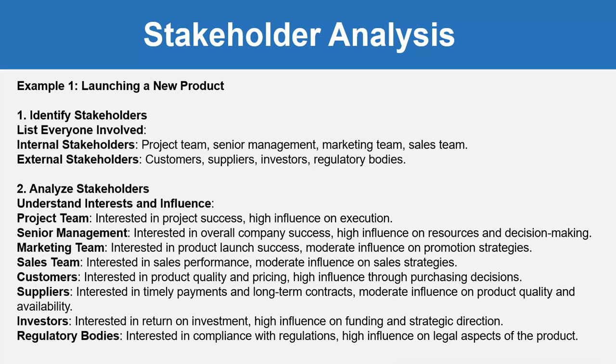Then analyzing the stakeholders means understanding the interest and influence of each stakeholder. For example, the project team is interested in project success and has high influence on execution. Senior management is interested in overall company success, with high influence on resources and decision making. The marketing team is interested in product launch success, with moderate influence on promotional strategies. The sales team is interested in sales performance, with moderate influence on sales strategies.